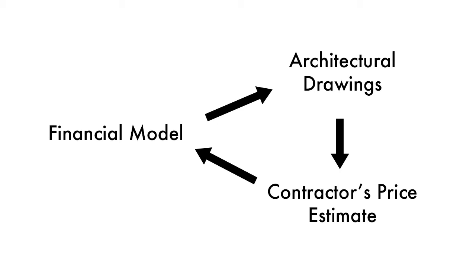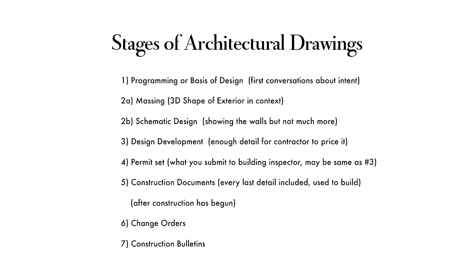A lot of back and forth, and hopefully you don't have any enormous misses where you build the plans to a 10-story building that the city absolutely will not allow anything higher than a 5. But that's where you hopefully cross that bridge early in schematic. So anyway, as you go through design development, you're going to develop a permit set, and eventually after the permit set, you're going to have your construction drawings, and sometimes those are one and the same. It just completely depends on the process of pricing with the contractors and approvals at the city.